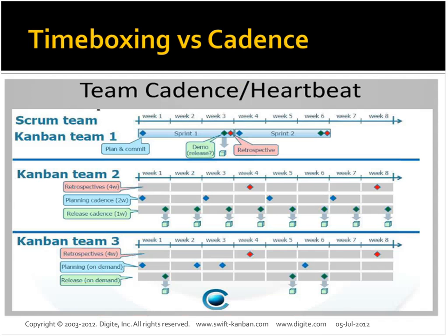planning. Or instead of doing 2 weeks at a time, you could also do a retrospective on a weekly basis, so that you figure out what is happening, rather than keeping it only for the end of the sprint and doing a demo. Okay. So it brings in a cadence where you can decide your own cadence and say, we will do release planning every 3 weeks, we'll do iteration planning every week, and we'll probably do a retrospective at the end of the week, so that we figure out what improvement opportunities we have identified, and therefore work through it.